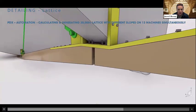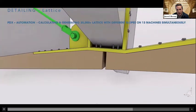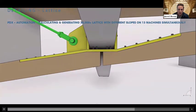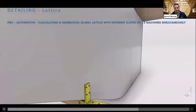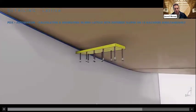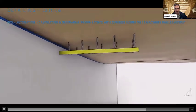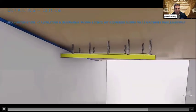There's also a hole right here that got created by this gap, and so we recommended putting a shim in there. And just bringing this information back to the client and the design team was really what helped answer and resolve a lot of issues during the design phase rather than during the construction phase. And this is really where we saw some of the major problems with that typical detail. That's the typical detail applied in this condition. You can see that you don't have bearing of that connection.